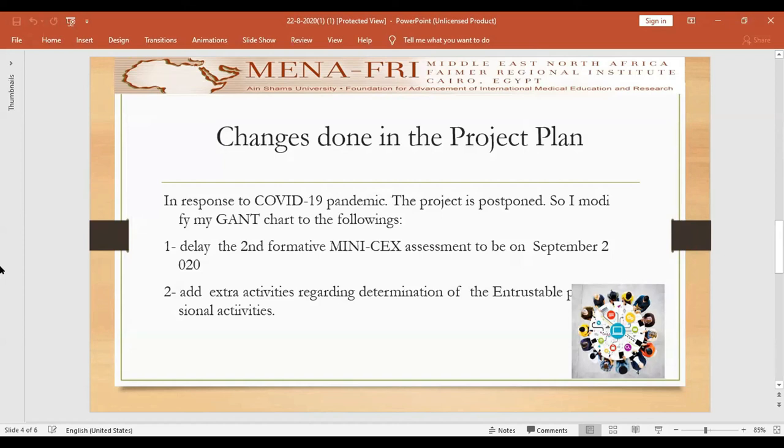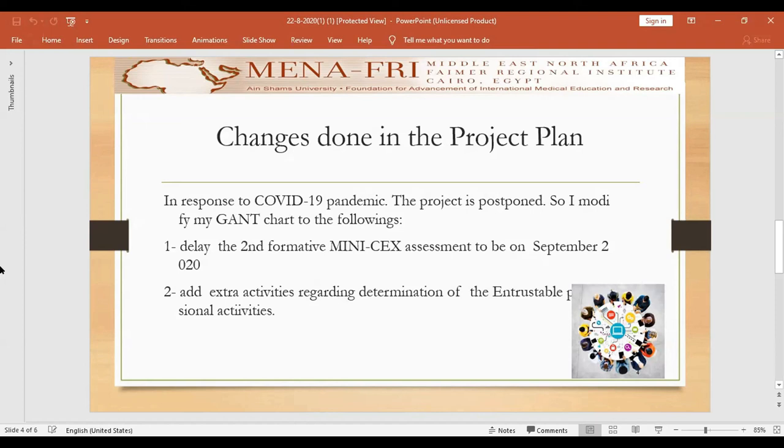We held online meetings from June up to now to define the milestones for master's degree students, and each milestone is divided into specific tasks that will be observed during formative assessment. Based on these meetings, we modified, though still not final, the checklist for mini-CEX and the assessor guide.